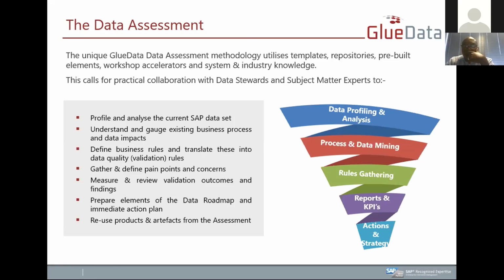okay. The assessment can be customized to look specifically at standard requirements. SAP gives you a very good starting point with the various objects and content provided, so that you can at least cover 60 to 80% of the effort up front without knowing what the final design is going to be. The migration program can then easily deal with the delta. It doesn't have to deal with 100% of the data requirement anymore. It can only then deal with the exceptions.